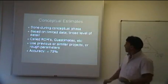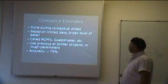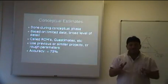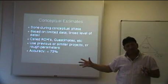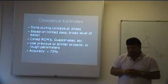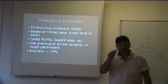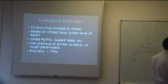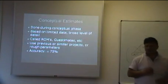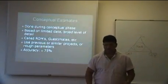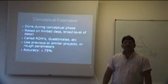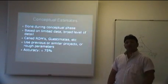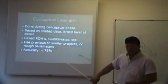That is what a conceptual estimate is all about. And where did you get it from? It used previous or similar projects for rough parameters. So when you have a project that you're currently busy with which is similar to a project that has been completed in the past, you can make use of that historical data as a rough order of magnitude estimate during a conceptual phase. What is the accuracy? If you look at the presentation, you will be more or less 75% accurate. Your accuracy is plus minus 75%. So the total project value, in terms of conceptual estimate, can never be your budget because it's only 75% accurate.